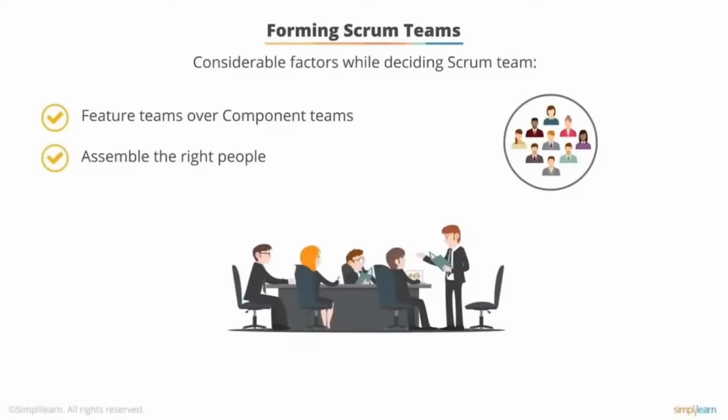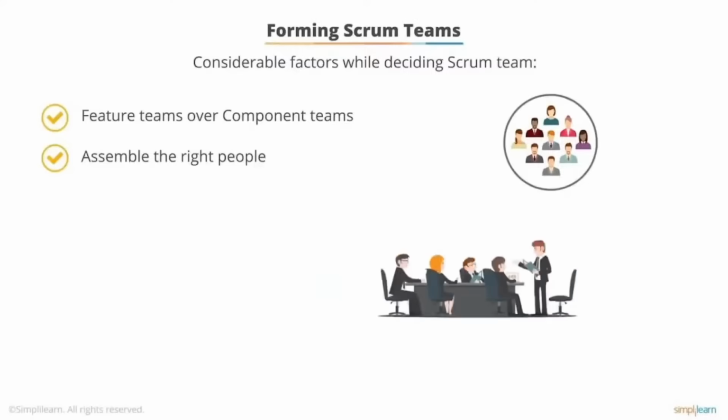One way to work around this is to deliberately favor diversity in all aspects: gender, ethnicity, personality traits, etc. It may take some time for the team to advance through the storming stage of team development and develop the trust necessary to work effectively together, but it can be done. Once a team has been formed, it's best to preserve and assign whole teams rather than individuals to projects. It's best to avoid assigning team members to multiple projects at the same time.